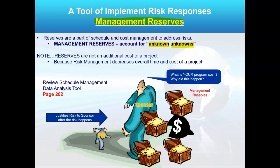When an unknown unknown occurs, we have to go to the sponsor and ask for support. And our boss usually says: 'What's this going to cost me? How did this happen? Why didn't you identify it?' Be prepared for a hundred questions. As a manager, I regularly would put away a portion of my budget. In one company where I managed capital projects — capital money to improve infrastructure that has to be spent by year-end — if I had a $1 million antivirus rollout program, I would tell finance not to give that number to my project manager. The project manager gets $850,000; I'd keep back about 12% as a management reserve for those unknown unknowns.